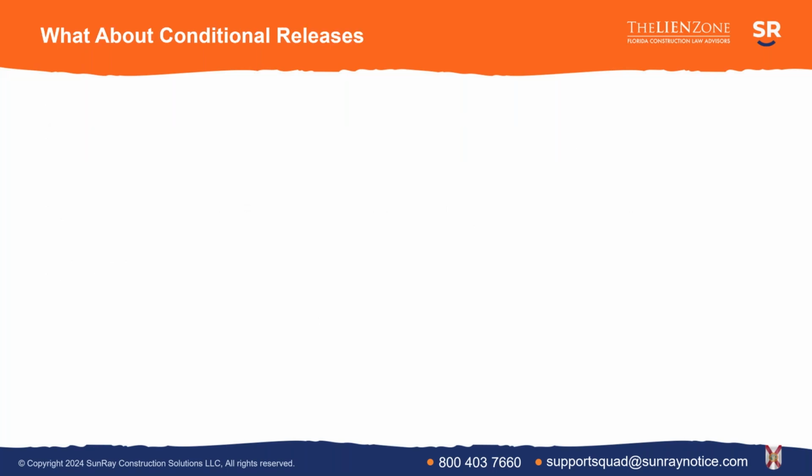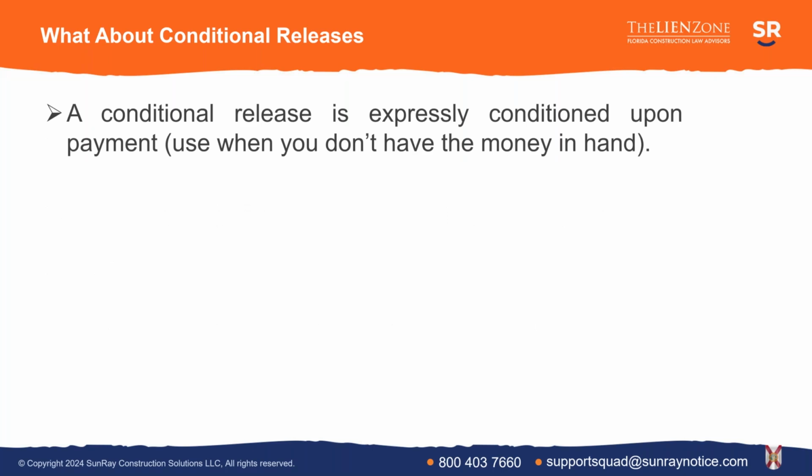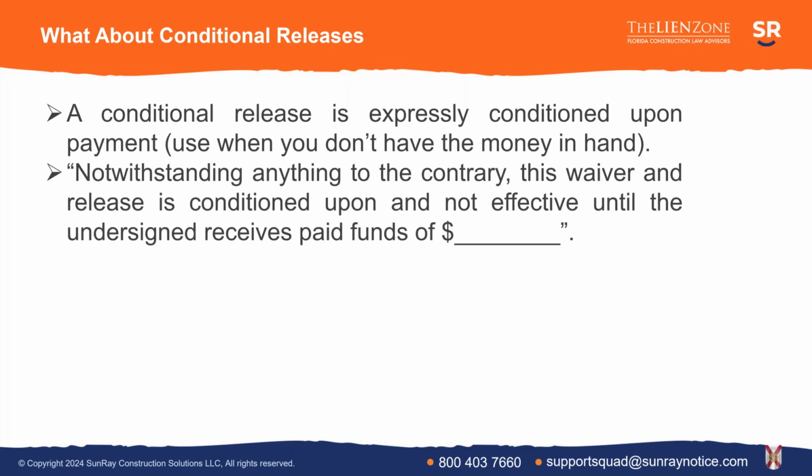which leads us into our next point, which is making releases conditioned on actually receiving the payment. So a conditional release is expressly conditioned on payment. That is when you get the money in your bank. So here's an example that you can type in, you can handwrite right into your releases. Notwithstanding anything to the contrary, this waiver and release is conditioned upon and not effective until the undersigned receives paid funds of blank. So if you're expecting a $10,000 check, you're going to write $10,000 in that blank.